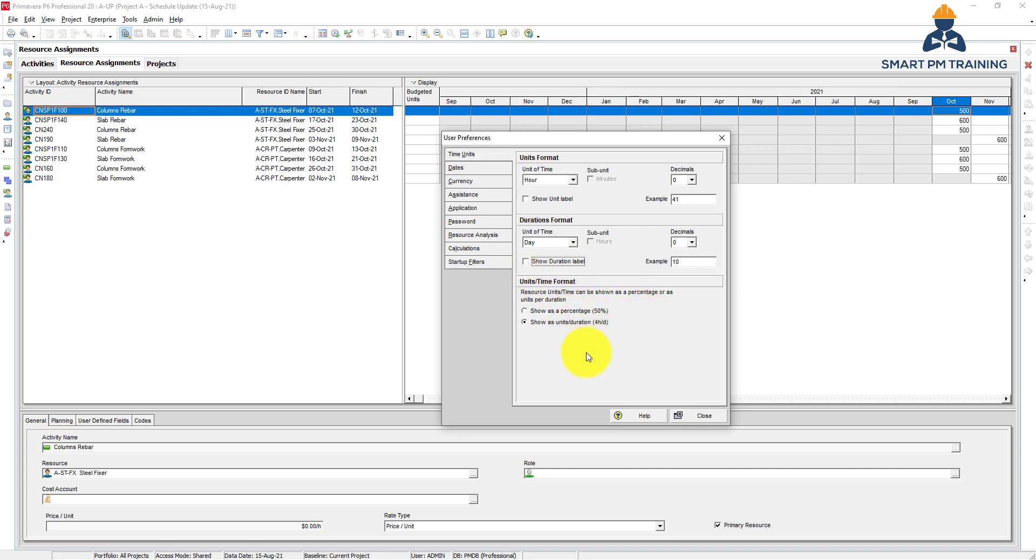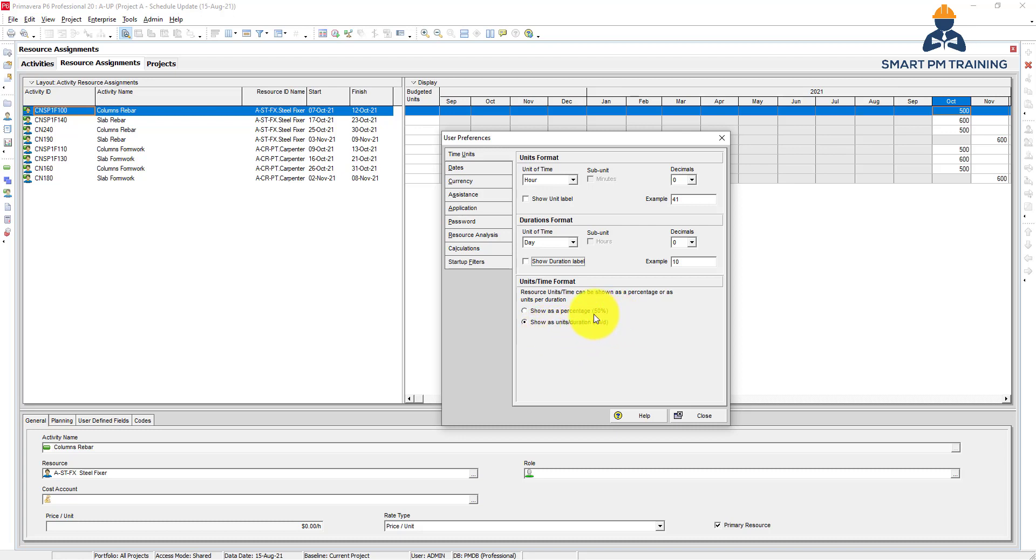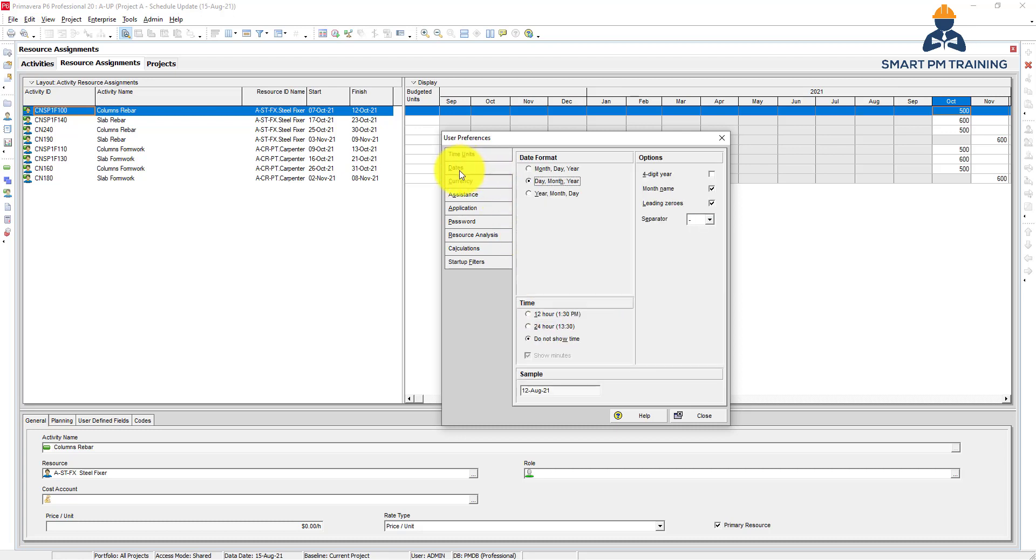Also units per time format, so how you want to present it. If you want to show that in resources, for example, we mentioned something like four per day or four hours per day. So you want to show the number of hours per day, or you want to see that if I have eight hours working a day and I have the units four hours per day, so four hours out of eight hours working a day. So you want to show it as four hours per day or 50 percent. Also I think it's better to keep it as it is.